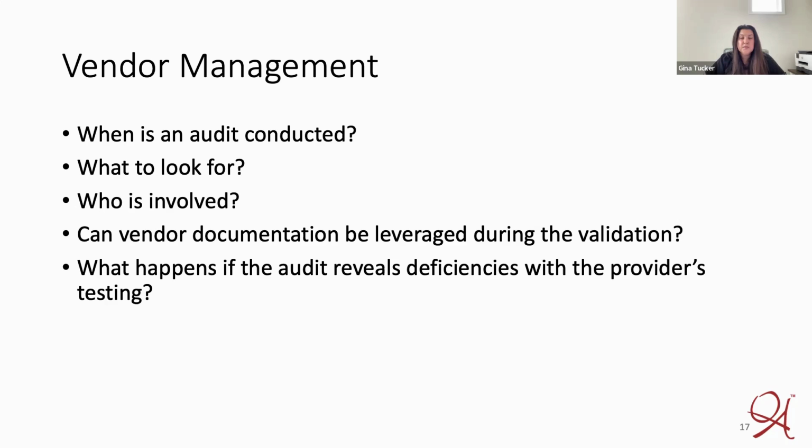Another key item to consider when conducting the vendor audit is looking at the vendor's validation procedures and their documentation, and seeing if it's feasible to work with the vendor to leverage part of their validation and testing efforts to incorporate into your own organization's validation of a computerized system. You can discuss this option during the vendor audit with the vendor and your team. And you want to make sure that your master validation program includes provisions for leveraging those types of documentation and what's required as a part of it.